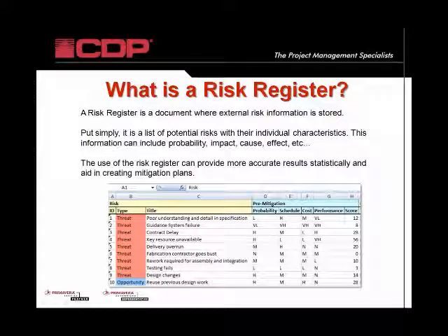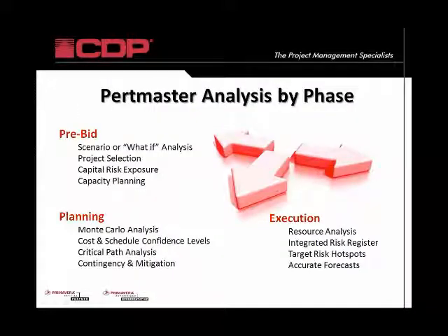So when we model these risks in, they become a living schedule. They get converted into schedule activities, with the main difference being that they have a probability of occurrence. So if I say it's a 100-day risk item, that's going to hit the schedule somewhere. But when we run the simulations, maybe there's only a 10% chance that those risks occur. That's basically what we're doing. We're just scheduling, and we're just putting in probabilistic values.